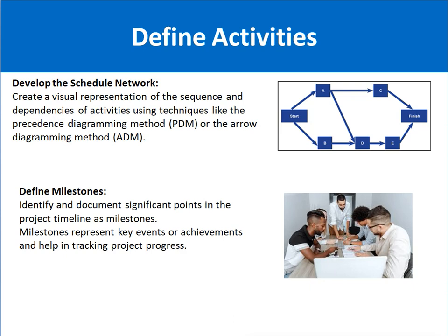Then, after that we have to develop the schedule network. Schedule network means you can use different diagramming methods like PDM, the precedence diagramming method, or the arrow diagramming method, ADM as well. It depends on you which is suitable for you.